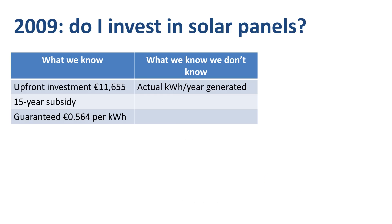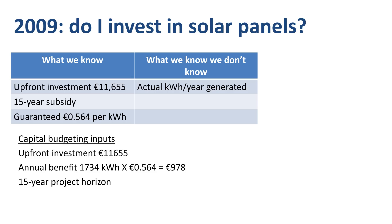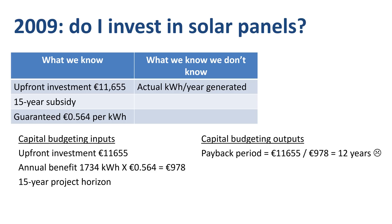What I obviously didn't know at the time — and was aware I didn't know — was the actual kWh that solar panels on my roof would generate. I took the capital budgeting inputs of the upfront investment amount, the expected benefit per year, and the 15-year time horizon, and calculated a payback period of 12 years, an NPV of just €20, and an IRR of 3.02%.